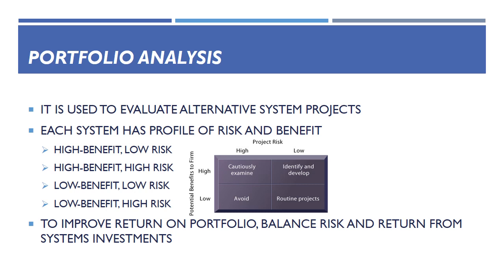There isn't a perfect profile for every company, but information-intensive businesses like finance should have a few high-risk, high-reward projects to stay on the cutting edge of technology. Businesses in non-information-intensive sectors should concentrate on high-profit, low-risk initiatives. Solutions with high benefit and low danger are most ideal — this guarantees low risk and quick rewards. Second, it is important to investigate high-benefit, high-risk systems. Avoid low-benefit, high-risk systems at all costs. And re-examine low-benefit, low-risk systems in case they can be rebuilt and replaced with higher-benefit systems.